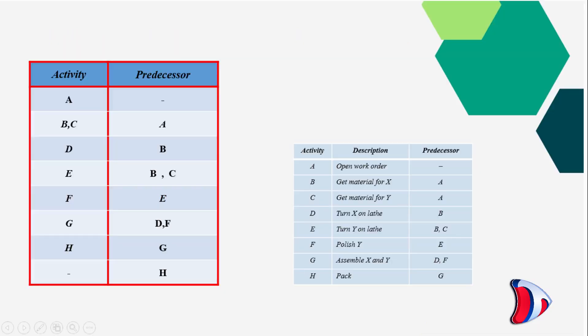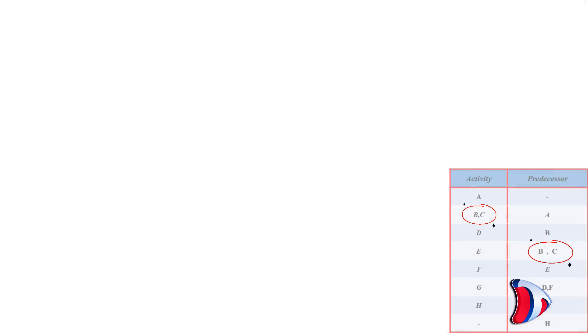Here we need to redraw the table showing the activities and their predecessor, so that we find out what all activities are starting from each predecessor. Here we must ensure that all the activities shown in activity column also feature in the predecessor column, and the last activity should be blank.